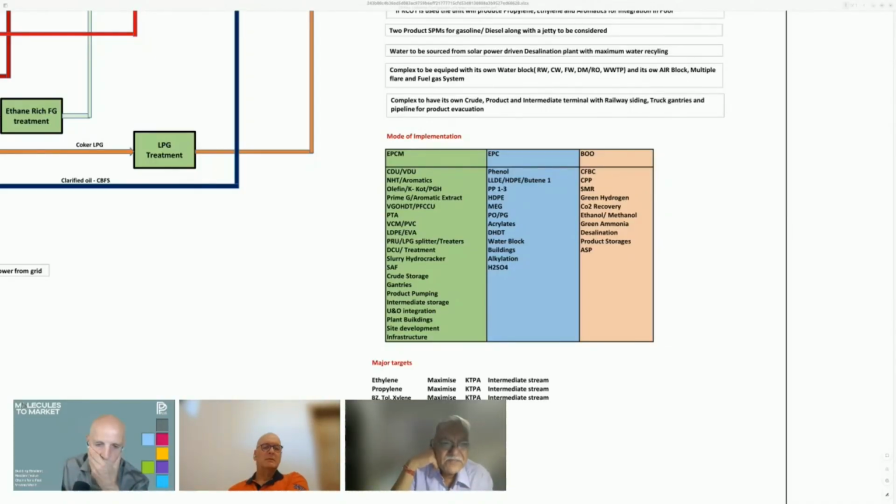Now, after this, there is an EPC schedule, which could be 30, 32, 36 months, whatever it is. So award plus feed, the overall time cycle is always a lot more than EPCM. Therefore, in India, we have built very few projects on the EPC route.